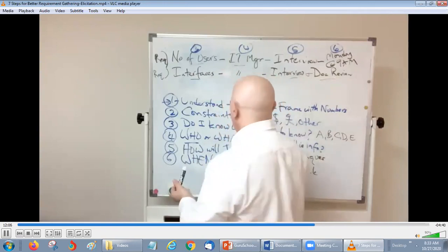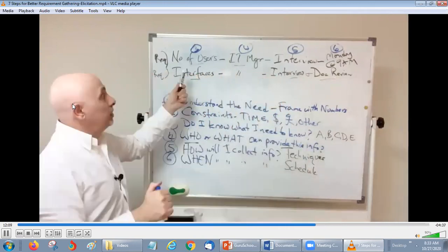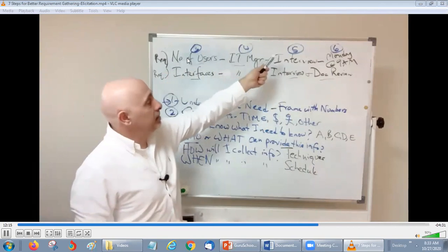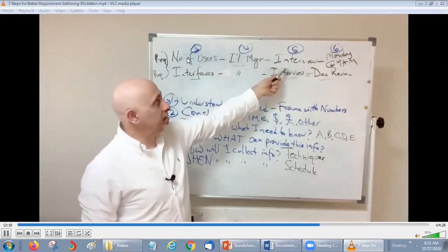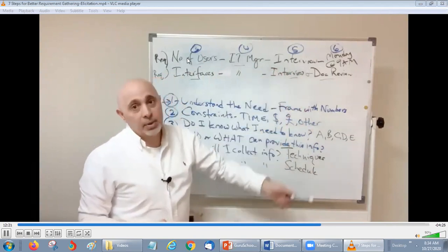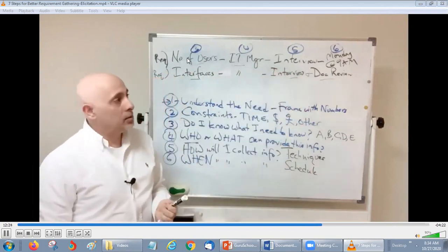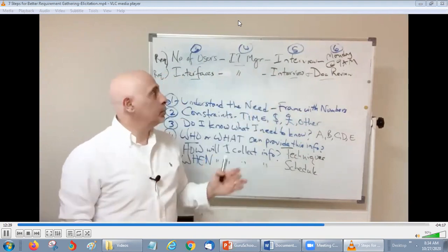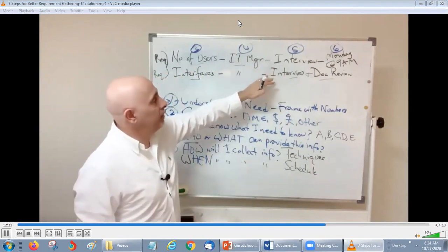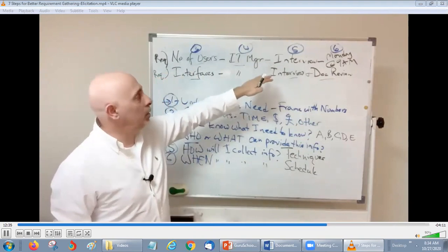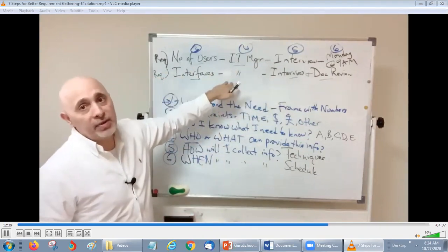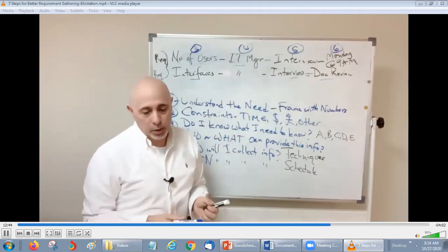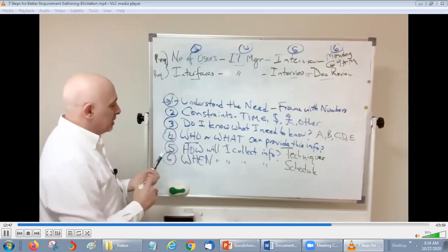Does that make sense? So here, step number 3, number of users, is a requirement. And step number 4, this is who's going to provide it. Step number 5, this is how I'm going to get this information using that technique. Step number 6 is when I'm going to get that information. So when you develop the schedule, as I previously discussed, you probably want to plan out the best timing or duration or techniques that will minimize the number of interactions that you're going to have with these stakeholders, so that they don't get bothered by what you're doing. So now, let's say you've developed a schedule.